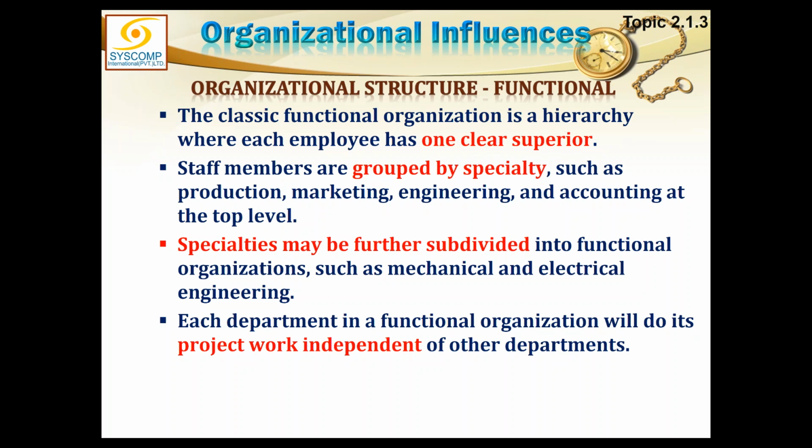Naturally, in a functional organization, people serving in a department would have been serving for quite some time, and they are very well aware of each other, their capabilities, and how somebody works, and therefore they have a certain kind of relationship and teamwork established. So if you try to drag one person out of this team for a project, that person himself will not personally like it, and the boss of that person will also resist giving this person, or for that matter any resource. It's not only the human resource; all other resources required for the project may also be resisted.